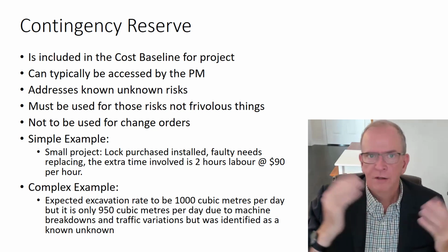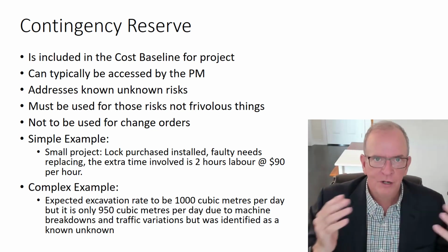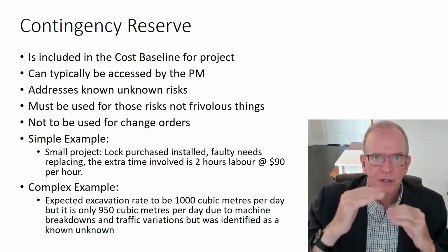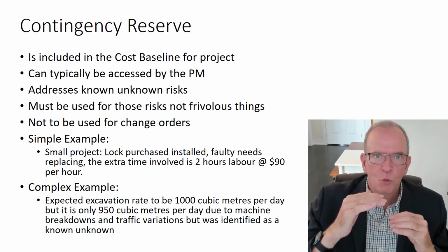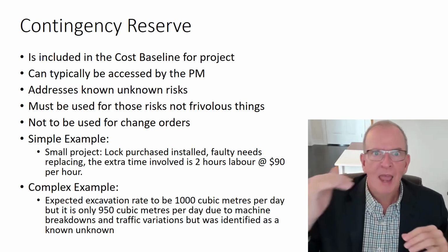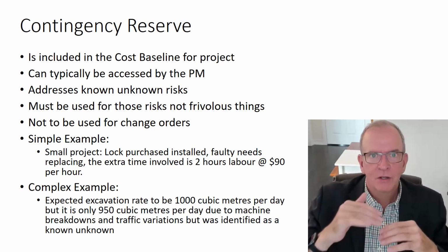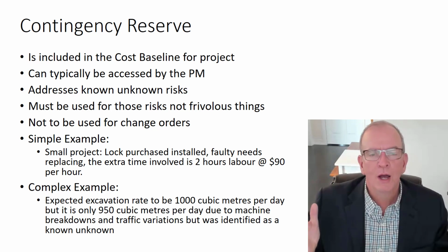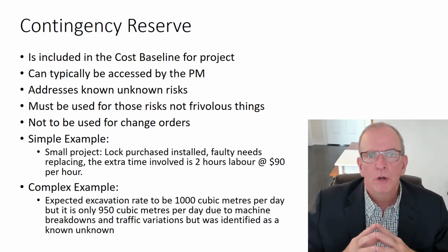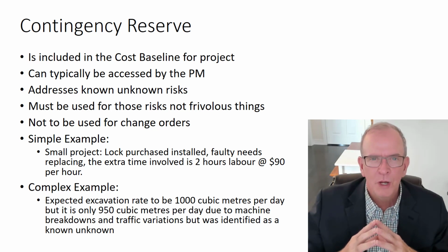It's the city of Toronto or the city of Chicago, wherever it happens to be, and you have this sort of adjustment, but it's not something that you wanted to price the whole project out at, taking every avenue and thinking that that's going to be the high and 100%, because you'd be too high in your price. But you did want to have a contingency in place that would help to mitigate some of that cost if it happens. So it's a known unknown.